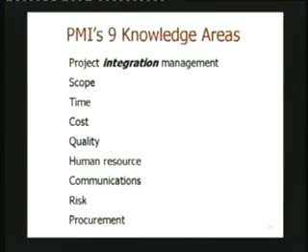What you do is, right off the bat when you're starting the project, you set up these protocols. If there are going to be changes made because of the external environment, for example, you already have a risk management plan in place. And that spells out what actions are to be taken in case plan A does not work. You'll have it all spelled out there. But if you reach a stage when a large change has to be made, like bringing in a new crane, or you need a different platform and new software, or you need people with different kinds of skills, there'll be an impact of that.